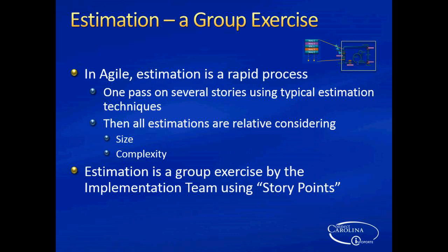But we rather quickly evolve to story points. We kind of scale and start using the concept of story points. And then estimates are relative, based on our judgment. But we don't spend a lot of time on it, right? You're filling the queue based on what your rough estimate is till you think you have filled the queue to the capacity of the team, right?